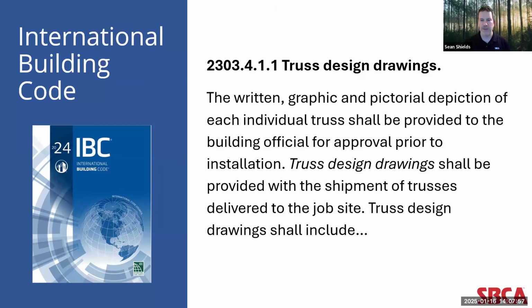While the code requires building officials to review truss design drawings for approval prior to installation, as you see in the words on the screen, these documents must also be reviewed and approved by the building designer prior to their submittal to the building official.